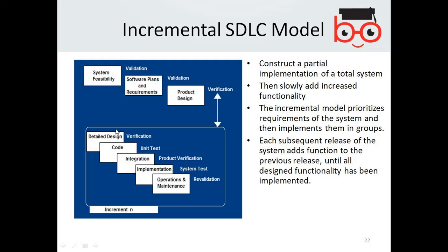Then what you need to do is implement a portion of functionality 1, then a portion of functionality 2, a portion of functionality 3, a portion of functionality 4. Then obviously you implement, code, integrate, and test. So do it in increments. Do a little part on every part of the project and go through, and then you verify it. Is it clear? Okay.